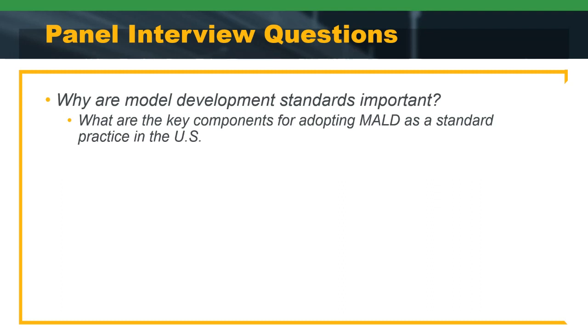I think the model development standards, and like John said, we've really been working hard with JTCES to develop a national framework so we have consistency not only from project to project, but from state to state in the US as well. So I think those are all really important, so we fully understand the use of this model information. Some information is going to be developed for automated machine guidance construction, but other information may be developed for things like visualization or quantities. We need to clearly convey that to the owner and the contractor, just to make sure we're on the same page. So that's what I would say on that one, Alexa.